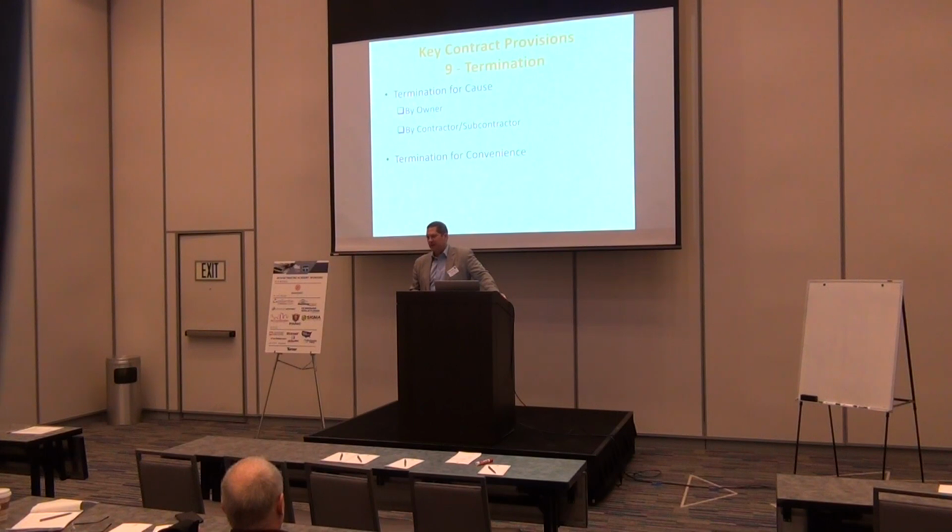It's a money thing. To terminate somebody is pretty drastic. If somebody's not showing up at the project, that's pretty easy. If they only have 3 workers show up and they need 15 to maintain the schedule, you can supplement. That's a dollars thing, not necessarily a termination. So termination is really a hard thing to do.